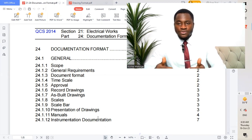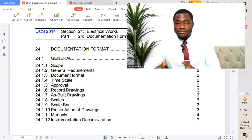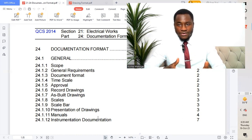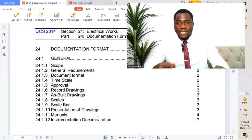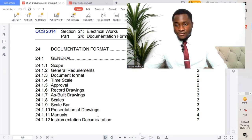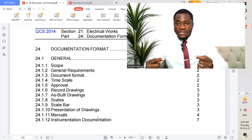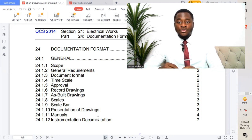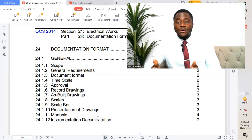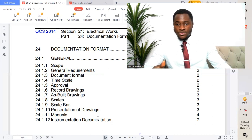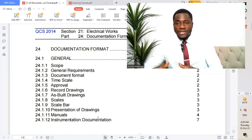These shop drawings are used in carrying out the different activities in the project. Once activities are being carried out and we have consultants on site, we need to submit an inspection so that we get approval prior to proceeding with the next phase or activity. We also prepare another drawing done by hand — a markup called a red line. We attach the red line alongside the approved shop drawings and submit to the consultant for review and approval.